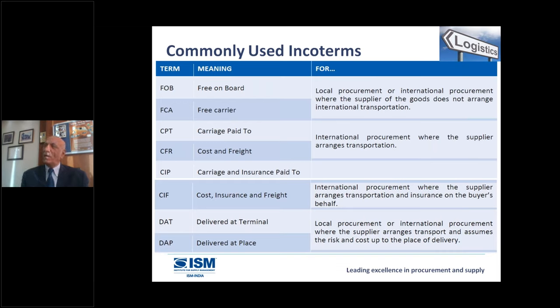Now, insurance normally extends, if you're having your own insurance, coverage of 30 to 60 days in storage at destination. So even when the goods have reached your warehouse, most insurance still covers 30 to 60 days. I am aware of the global insurance I had: all our goods worldwide, whichever warehouse they went to, we used to have 60 days coverage even after receipt in the warehouse. Suppose damage happens to the warehouse and the goods are lost, I can claim for that.